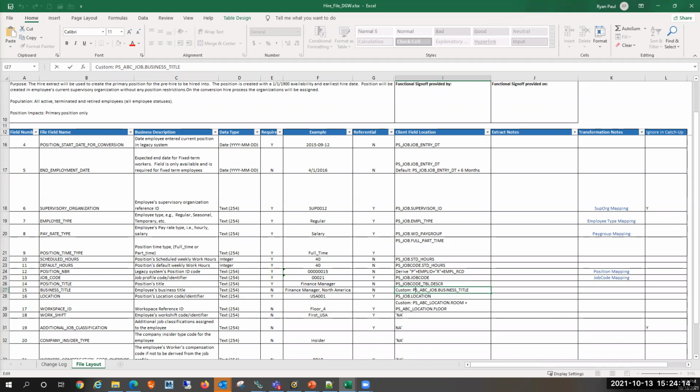Can it impact the timeline? Absolutely, but you build that into the project, right? Are we turning new functionality on? Yes. So we have to not only get the data across from a conversion perspective, depending on what it is, but then we're standing up a new piece of the tower within our own application. But if you're standing up the whole thing, it may not add that much time. It would impact testing, right? You're going to test an integration feed versus functionality. There may be more configuration involved, which could be a longer lead on your project than just doing an integration point, because all the configs already exist in the third-party system. Right.